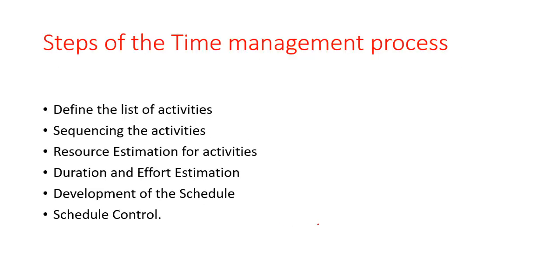We have different steps in the time management process. These are: first, define the list of activities; second, sequence the activities; third, resource estimation; fourth, duration and effort estimation; fifth, development of the schedule; and sixth, schedule control.